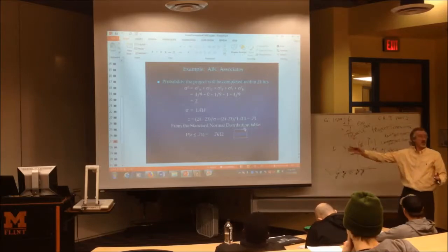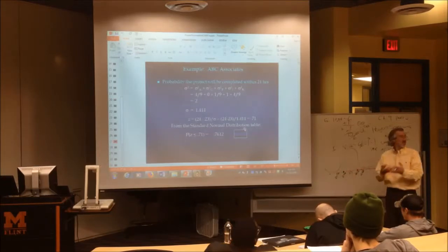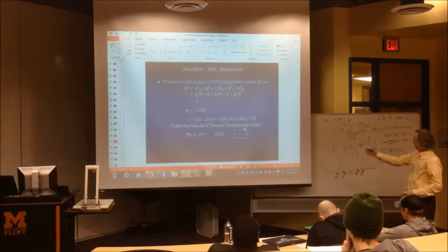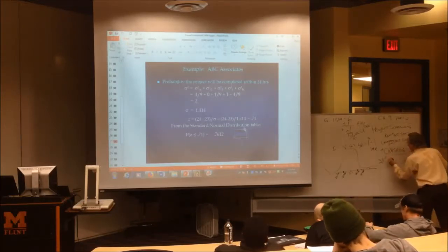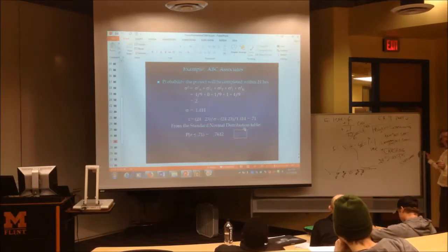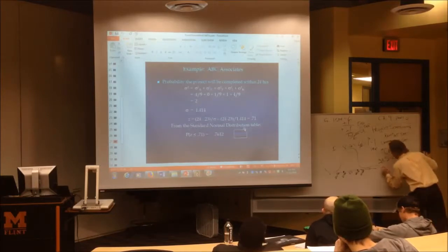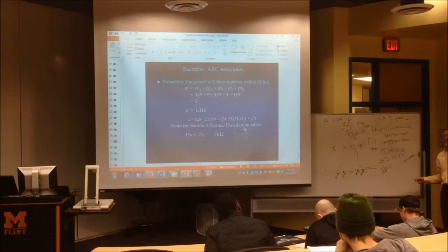Now, let's see if we're right. Here's the calculation. Everybody goes, oh, what am I doing here? It's so easy to estimate it that this calculation now will be obvious. You take whatever you're being asked about and subtract the expected time. The expected time is the second number, and this way you don't have to figure out whether this is supposed to be negative or positive. 24.5 minus 23 equals 1.5. Now you divide that by the standard deviation of the project. 1.5 divided by 1.414 equals 1.06.